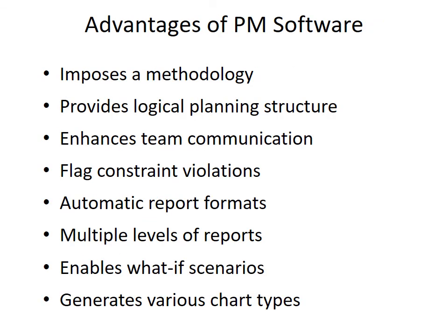What are the advantages of using PM software, project management software? So first of all, it imposes a methodology and also provides a logical planning structure. So when you put your process in the project management software, people can see what are the processes that they should follow and what is the structure of the project. It enhances team communication because all the team members can access this planning, okay, and it can also flag constraint violations, meaning when you insert your progress in the project management software, you are able to see if there are some activities that have violated your planning structure or your methodology.